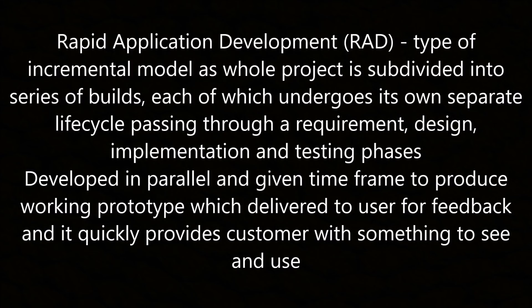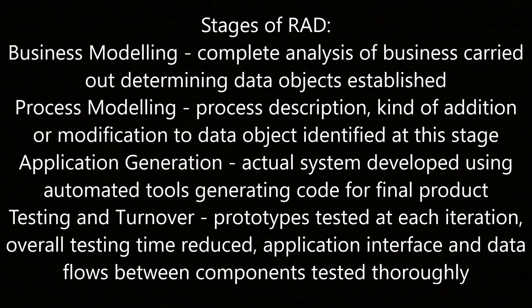Rapid application development, or RAD, is an incremental model where the whole project is subdivided into a series of builds, each of which undergoes its own separate lifecycle passing through requirements, design, implementation, and testing phases. It's developed in parallel and within a given time frame to produce a working prototype delivered to the user for feedback, quickly providing the customer with something to see and use. The stages of RAD include: business modelling (a complete analysis of the business determining data objects); process modelling (process descriptions for additions or modifications to data objects); application generation (the actual system developed using automated tools generating code for the final product); and testing and turnover (prototypes tested at each iteration, with overall testing time reduced and application interfaces and data flows thoroughly tested).